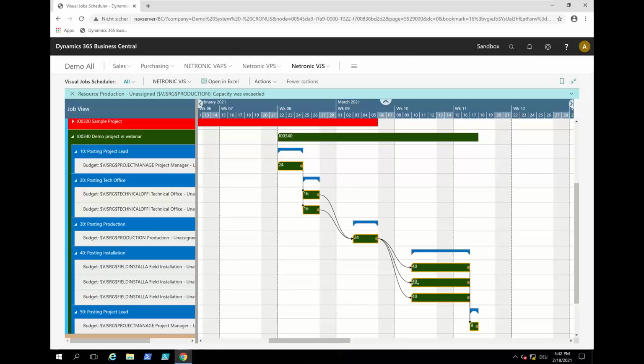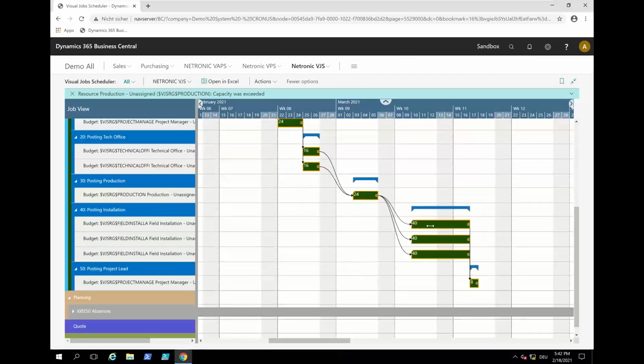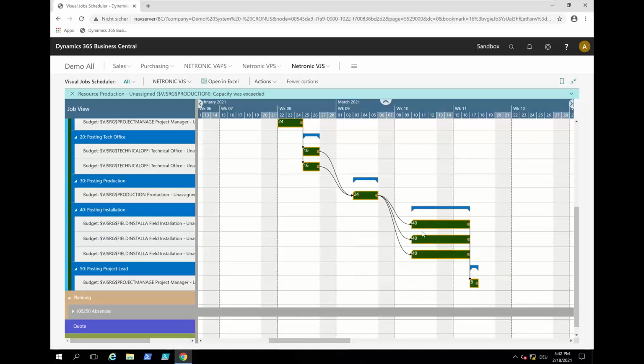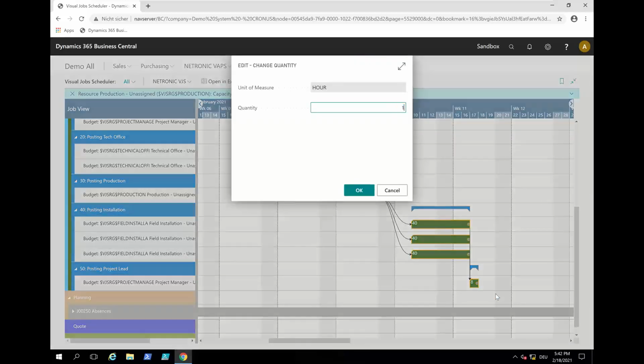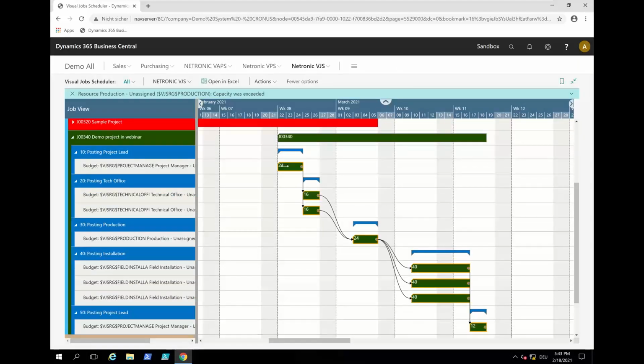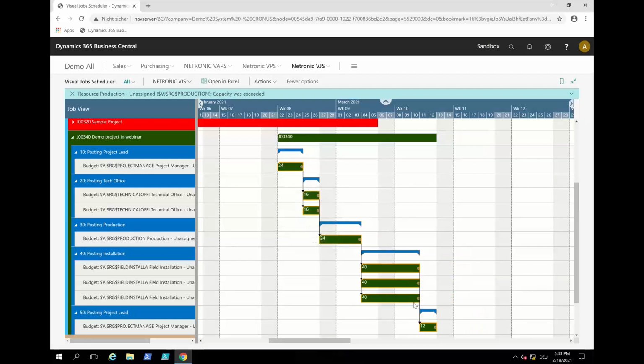And then I say, okay, actually, this pretty much mirrors the template. So I will need a week with 3 guys on site. But here again, I know the customer is a little bit picky, so I better plan for 1.5 days of my project manager being on site again for the final acceptance. And then from here, I can say like scheduled successors, and then I have the ideal structure again.